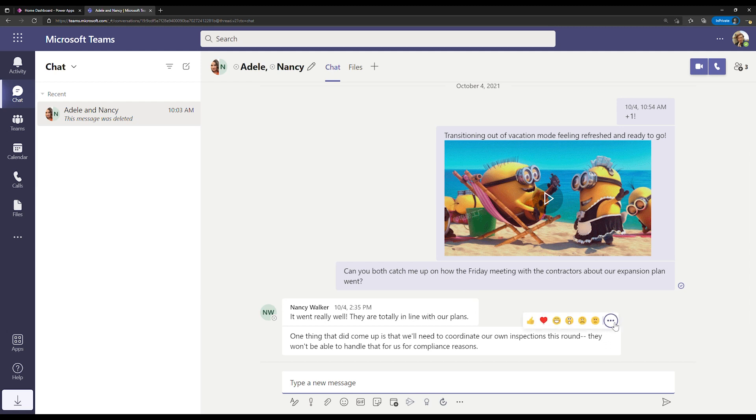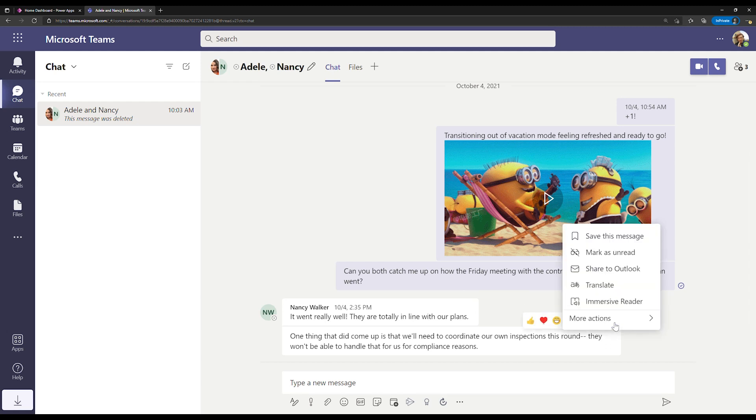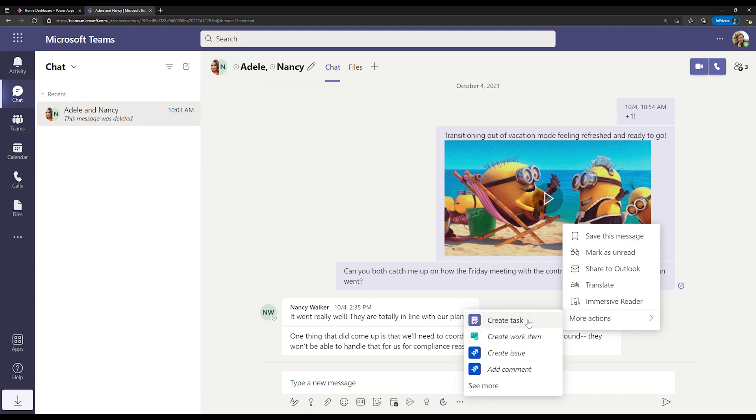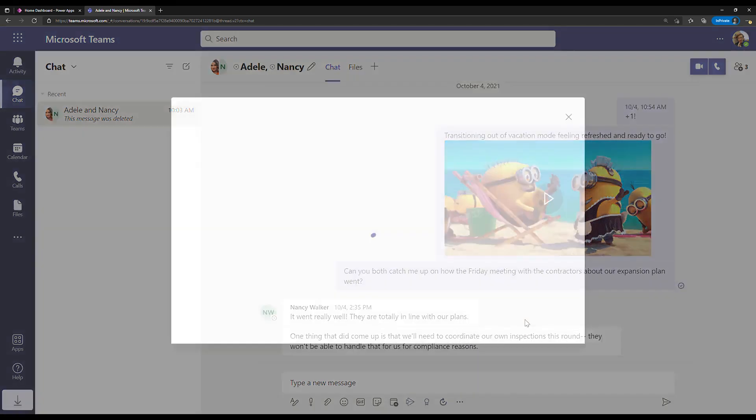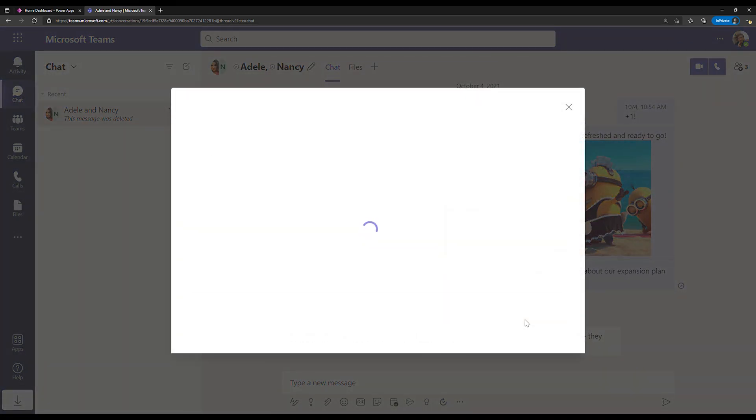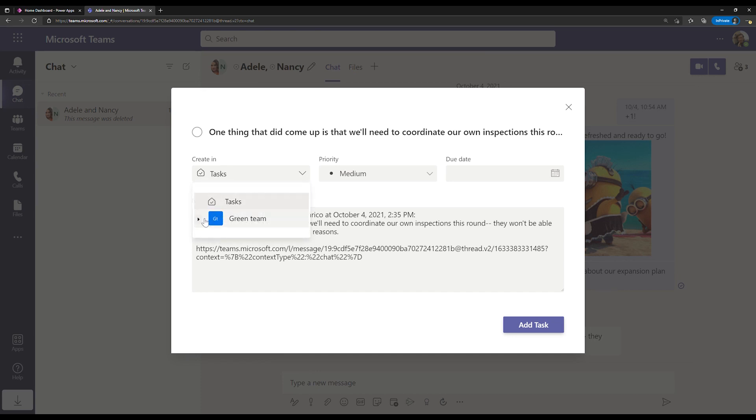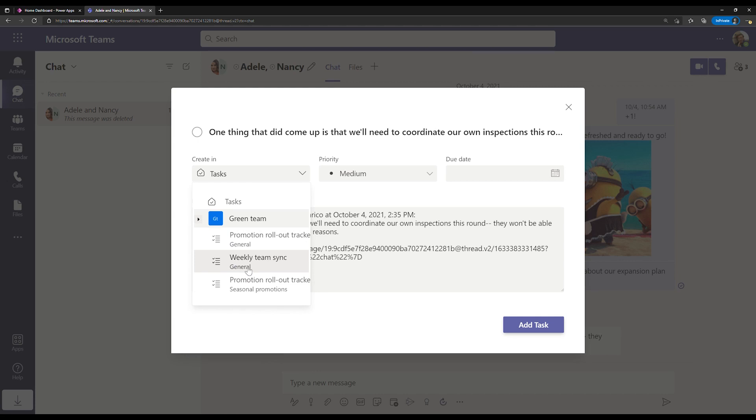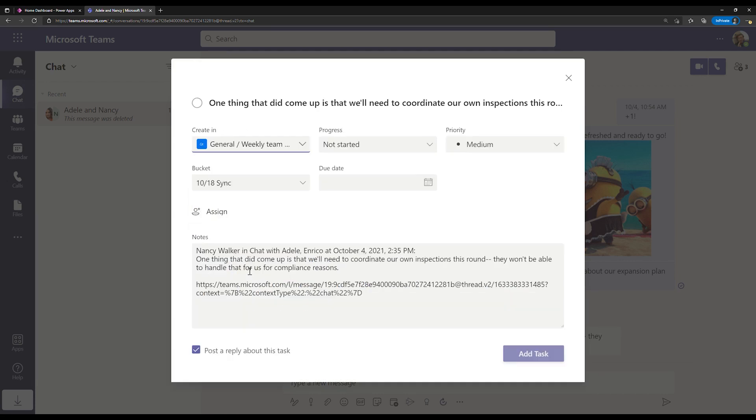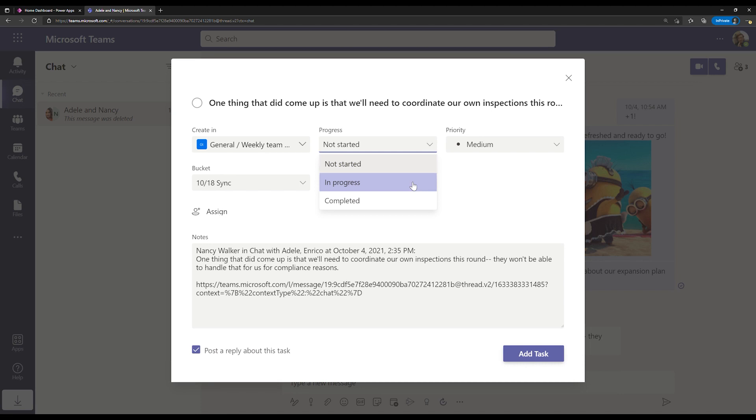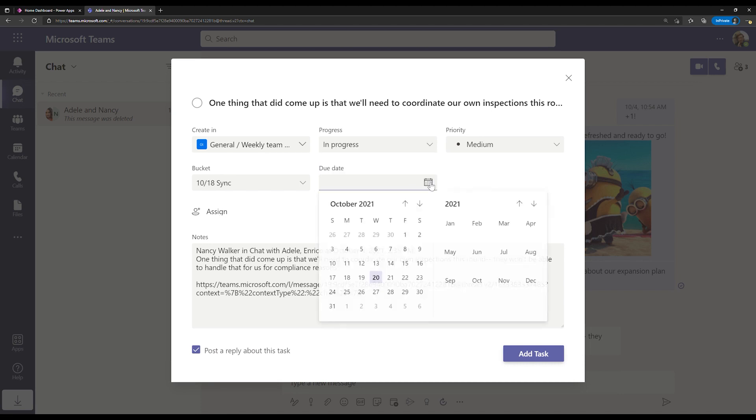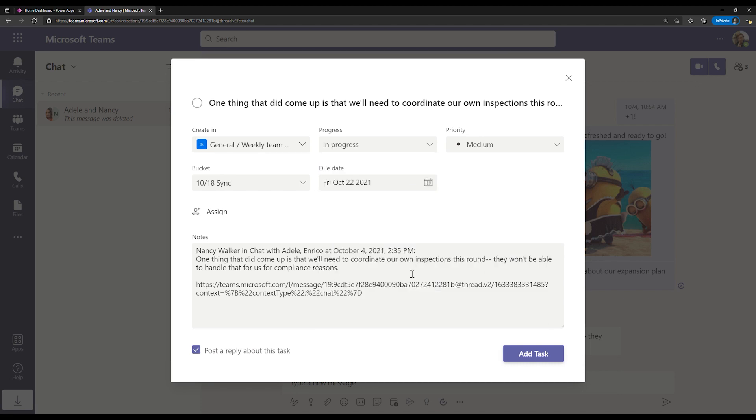I can choose to see more options for this chat thread and select create a task. Now, once I'm here, I can choose the plan that I want this task to show up in. Here it's going to be my weekly team sync. I can update details I care about. In this case, the progress and the due date. And then I can add this task directly to my plan.